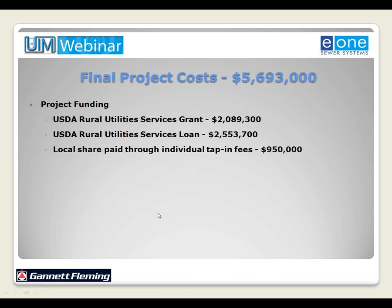In our final project cost for the pressure sewer system, $5,693,000. Project funding, back in the day, if you will, almost 10 years ago: a USDA Rural Utility Services grant of $2,089,300, which was about a 35% grant, and a 40-year loan through USDA Rural Utility Services in the amount of $2,553,700.